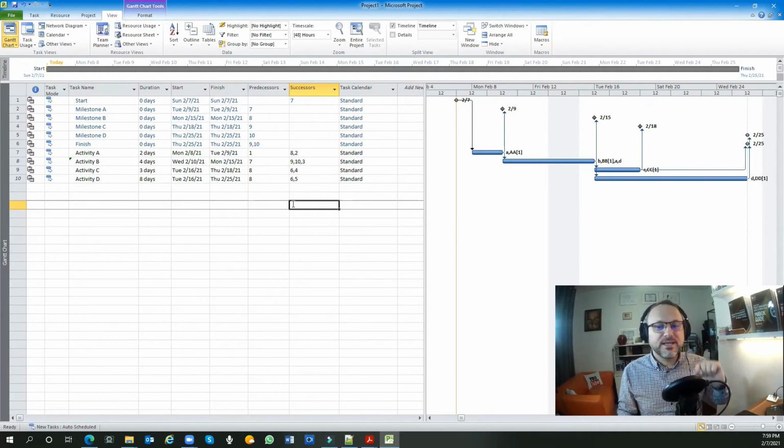Go back, and each activity must have a predecessor and successor, because once an activity is started, there is something before as a condition to start this activity. Once this activity is finished, it's giving a delivery to another activity. If there is no other activity, then there is a milestone, or could be a finish milestone, because later, when you finish with all your activities, you need to start making the critical path analysis.